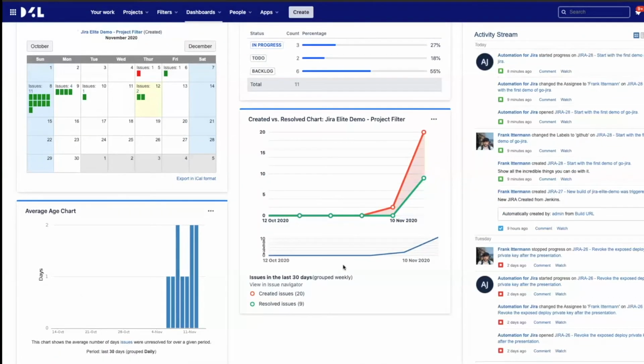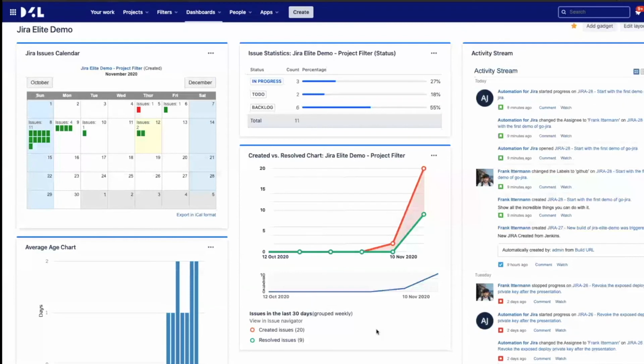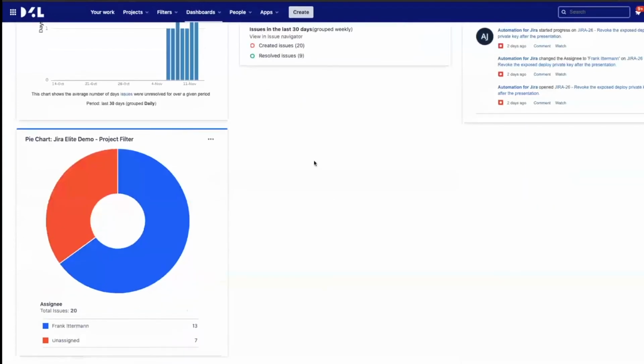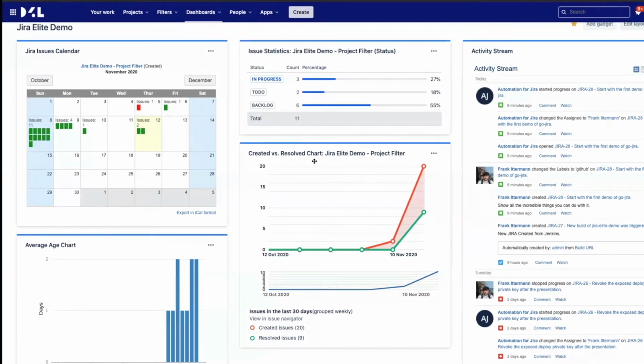So this is more for a rough overview. It's also good for a product owner, but for me, it feels like it's more for a team lead to see velocity or workload related stuff. You can see what is the ratio of tickets assigned to one person, maybe one in your team gets all, or it's widely distributed, but don't over-interpret these numbers. They are just giving you more of a tendency where you can then ask things or go a little bit deeper. It's not hard science, I would say.